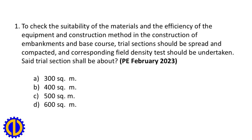To check the suitability of the materials and the efficiency of the equipment and construction method in the construction of embankments and base course, trial sections should be spread and compacted, and corresponding field density tests should be undertaken.